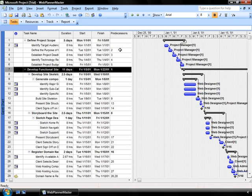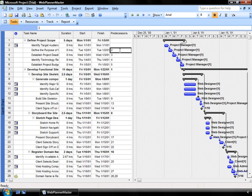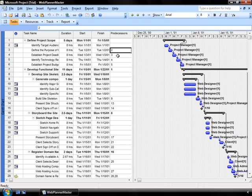In this case, if we take a look at row number three, the defining the purpose or the mission statement of this particular project, I've identified that it needs to happen after I identify my target audience. As well, in the next phase, establishing the project deadlines needs to happen after I define the purpose. So I've identified my predecessor tasks here.